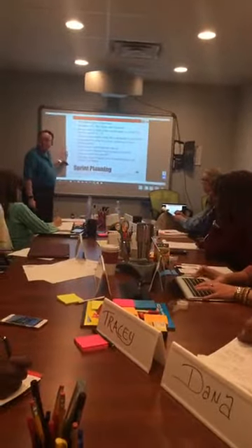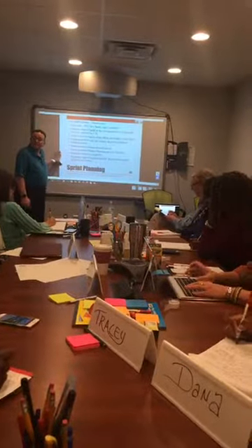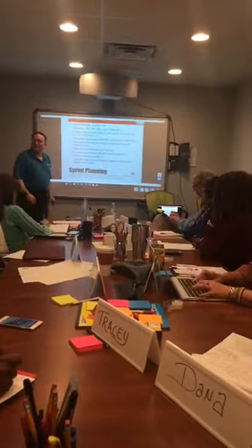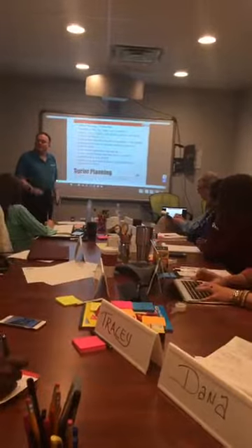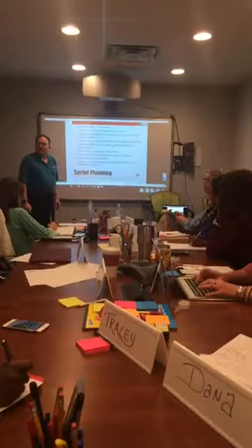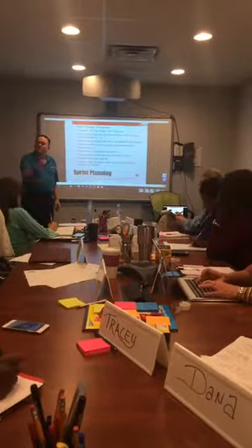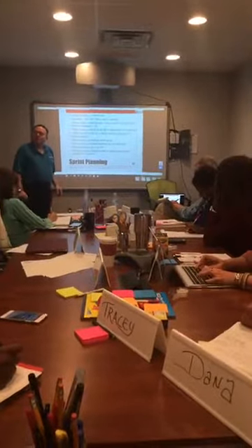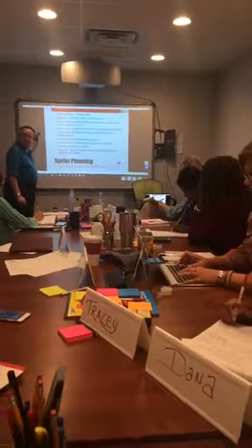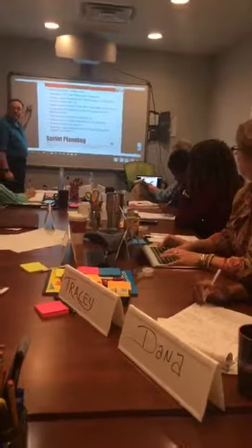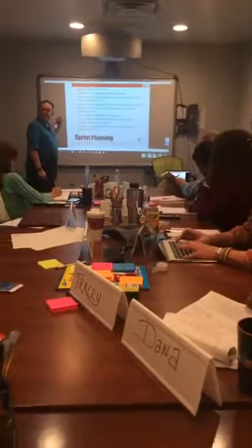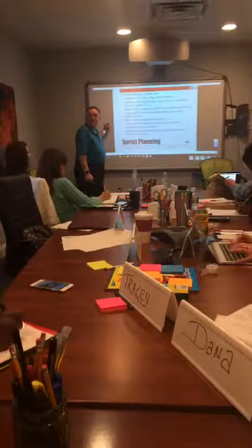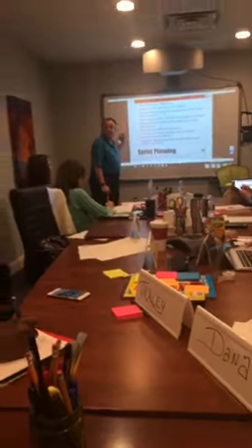the next 2 sprints. Now, if something changes, you're going to have another sprint planning meeting after the current sprint. And if you need to make any adjustments, you can do that. Let's say your team identified a defect from the previous sprint. You communicate that to the product owner. The product owner adds that to the product backlog. So it's not just requested functionality, it's a defect. But it's time that your team may need to spend working on it to fix it.